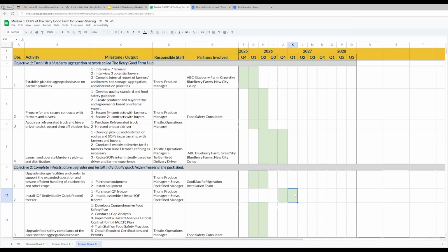So for a 3-year project, you're going to want to think through a few more things because you definitely want to match the length of your project with the full grant timeline as best you can. That's how you know you're doing an ambitious enough project. So here, zooming out and looking at the big picture, shows us we have plenty of time to work in another objective, maybe two. So based on the priorities of the grant, that could look like getting the IQF blueberry